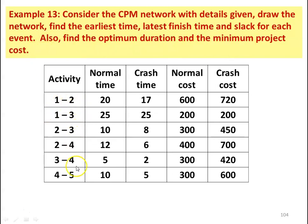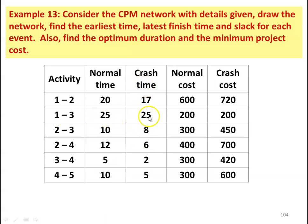We take example number 13. Consider the CPM network with details given. Draw the network, find the earliest time, latest finish time, and slack for each event. There are 6 activities: 1-2, 1-3, 2-3, 2-4, 3-4, and 4-5. The normal times are 20, 25, 10, 12, 5, and 10. The crash times are 17, 25, 8, 6, 2, and 5.